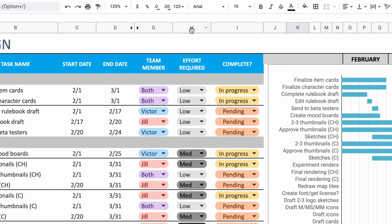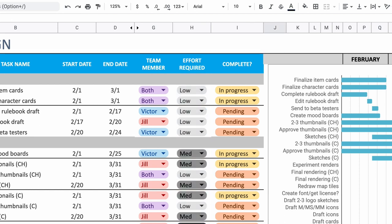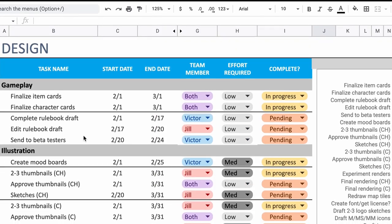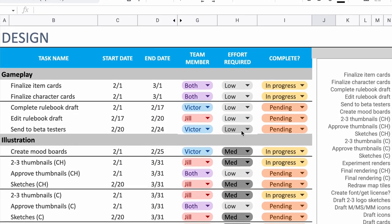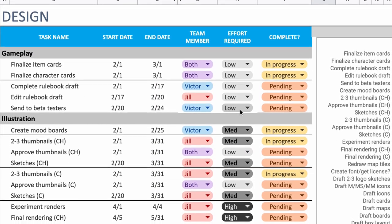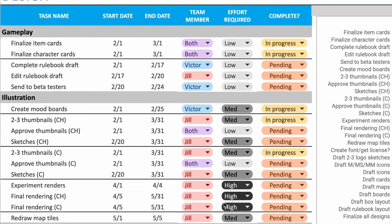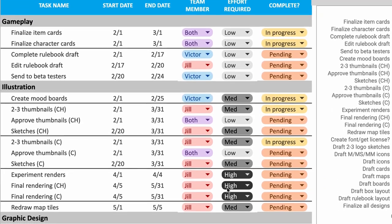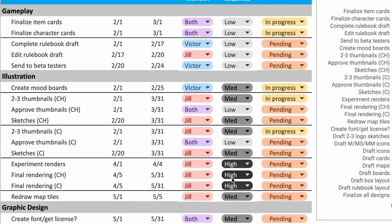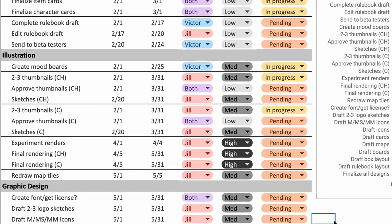I also added in a column for effort required. This tells us how light or heavy a task will be in terms of effort and number of hours. Certain things are super low effort and won't take more than an hour or two. Alternatively, high effort tasks will take multiple days, if not weeks.